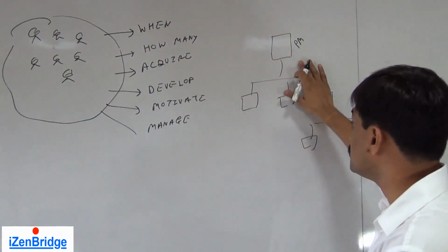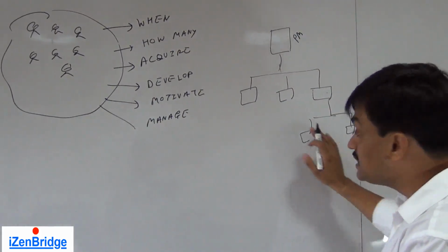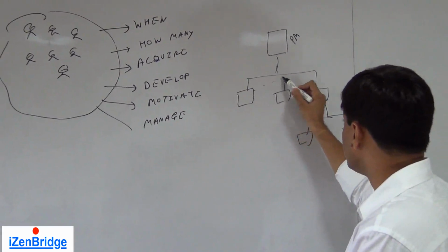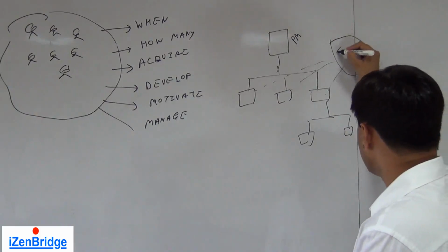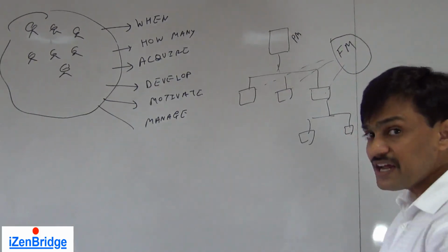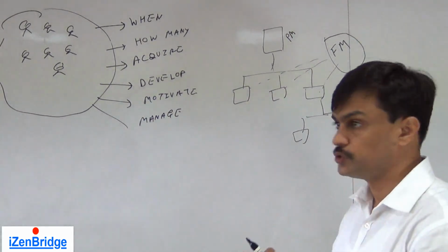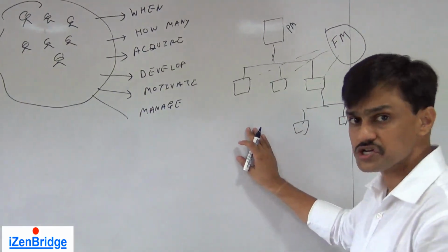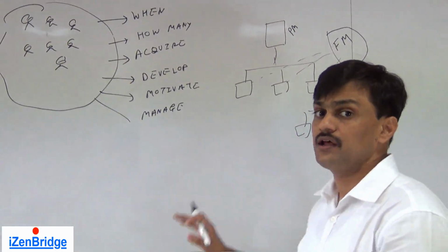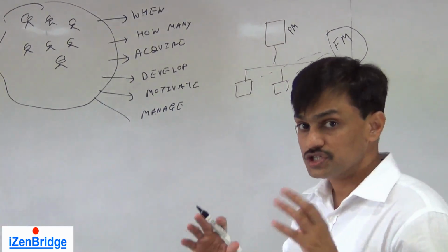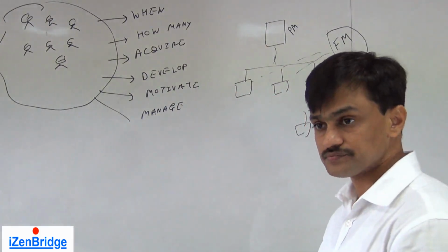And since you are the CEO, you are responsible for all these people. These people may also have some dotted reporting to their functional manager. By default, if it is not specified, you need to assume a strong matrix organization, because the majority of projects are executed in a matrix organization structure, usually giving more power to the project manager.